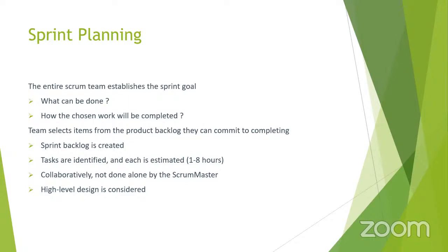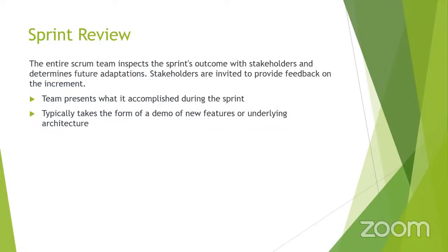You can estimate in a time frame, like whether you're going to spend 1 hour on this task or 8 hours. And this is done by the whole team. It's not the Scrum Master picking up the task and saying, okay, this team member is going to do this and this is the time. It's not like that. It is always a collaboration. And also we have to consider high-level design during the sprint planning.